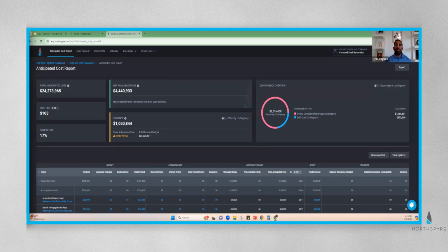So going back to my little story at the beginning, we, like many other groups out there, I'm sure, were using the draw spreadsheet as a gauge of where things stood. Well, number one, information is flowing constantly. So by the time I'm looking at that draw spreadsheet, it's probably a little stale. There's probably some new costs that are being accounted for there. But more importantly, that draw spreadsheet only told me what happened in the past. And again, we have separate spreadsheets to keep track of hard costs and exposures and all these different things. But without that comprehensive view of how it was all coming together, we lack the needed visibility. And in our case, we ultimately took a hit because of that.